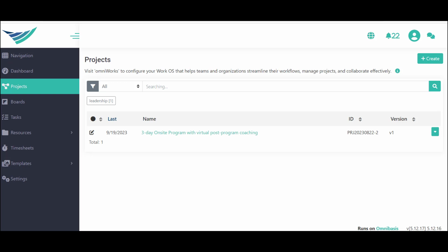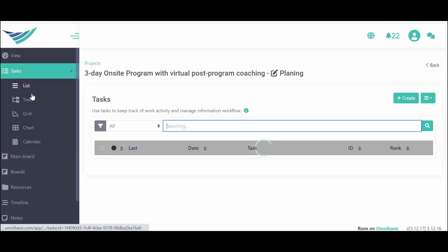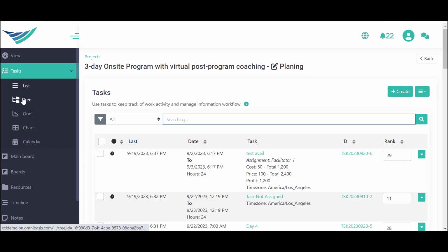So we covered that, adding the resource to the task. Some resource activities may be scheduled at precise time before, during, and after the program. So you can assign specific start and end, or you can leave those fields empty. The resource will still appear on the work breakdown structure, even so it's not assigned to a specific date.